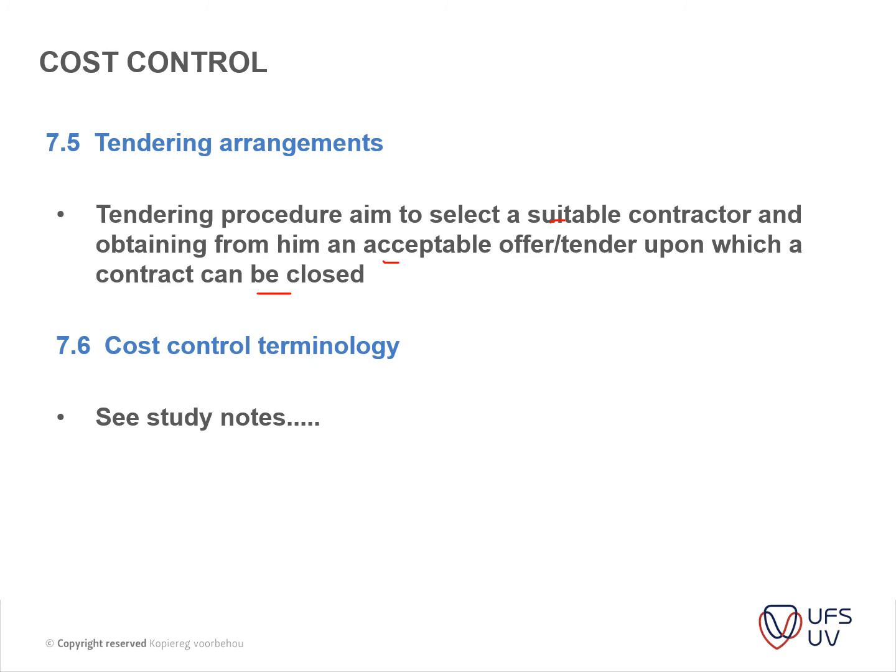For instance, if you do go into construction, you can still show savings by altering the finishes, for instance, and so on. But altering the shape and, for instance, the intricate design of an air conditioning system might be too expensive to alter during the construction stage.